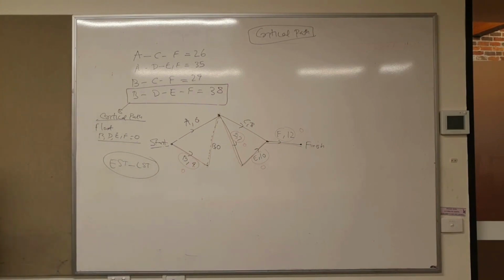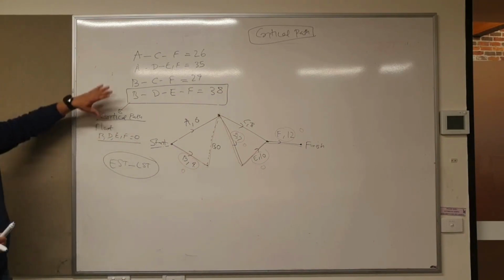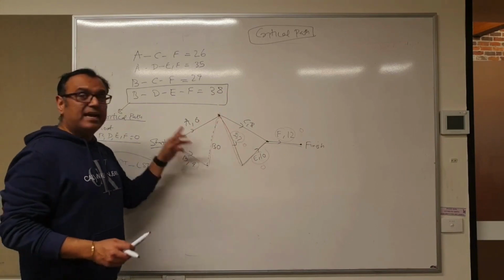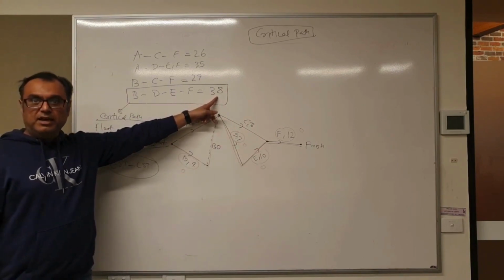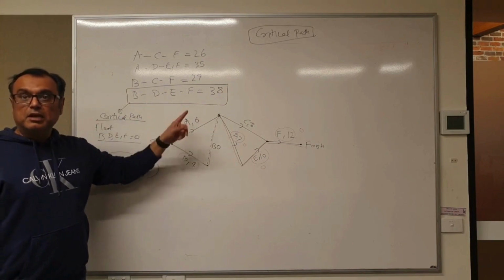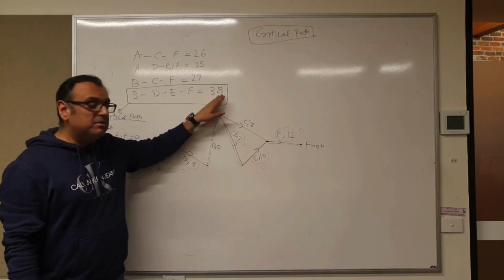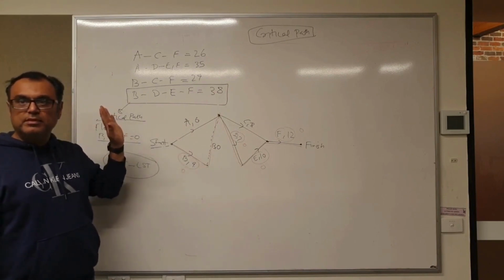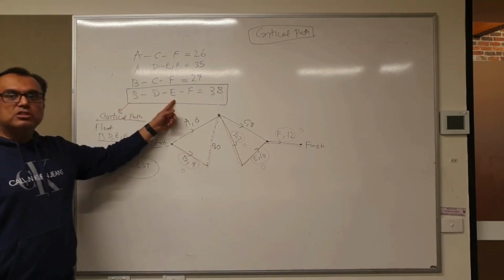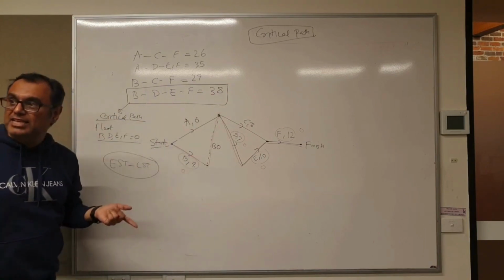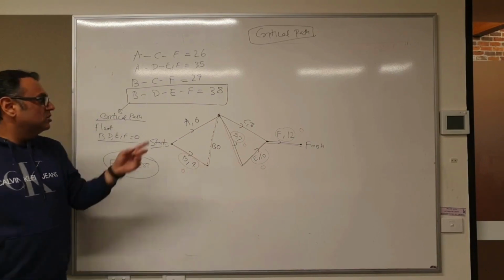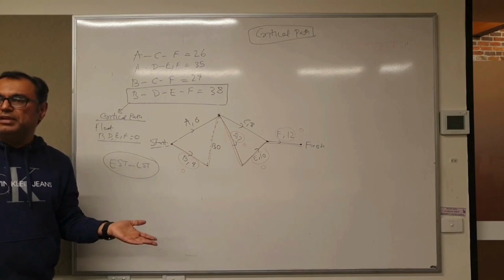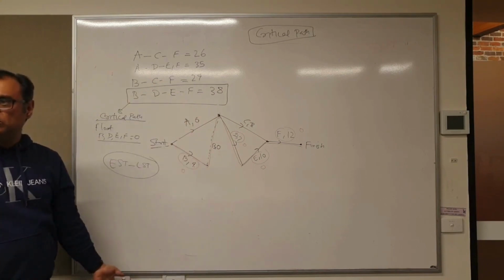Now let's try to understand the earliest start time first. Is this clear? So again repeating, any path which has the maximum amount of time is the critical path. Critical path is that path which is the minimum time for this project to finish. You cannot delay activities on the critical path. So when you say you cannot delay the activities on the critical path, that means float is 0. Float is how much time you can delay. So float is 0 means that you cannot delay it even by a minute or a day, depending upon the context of the question.